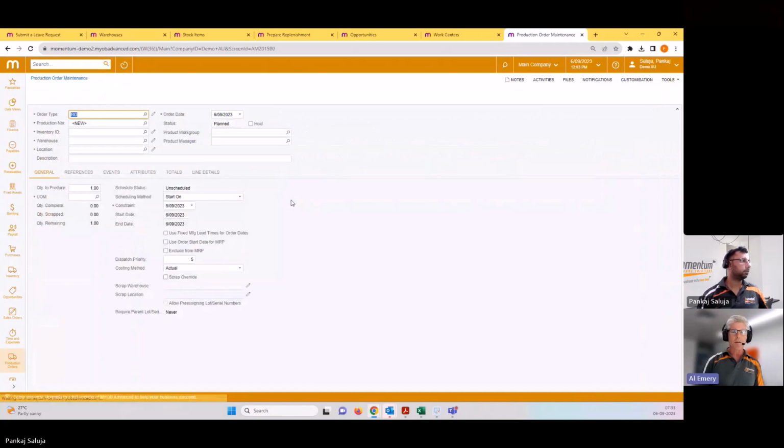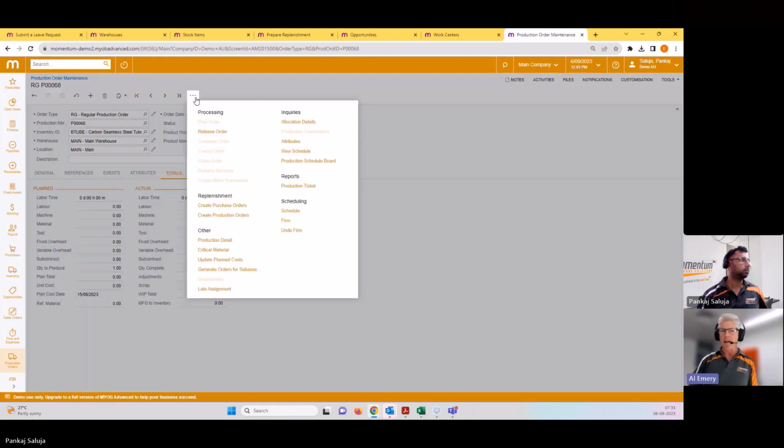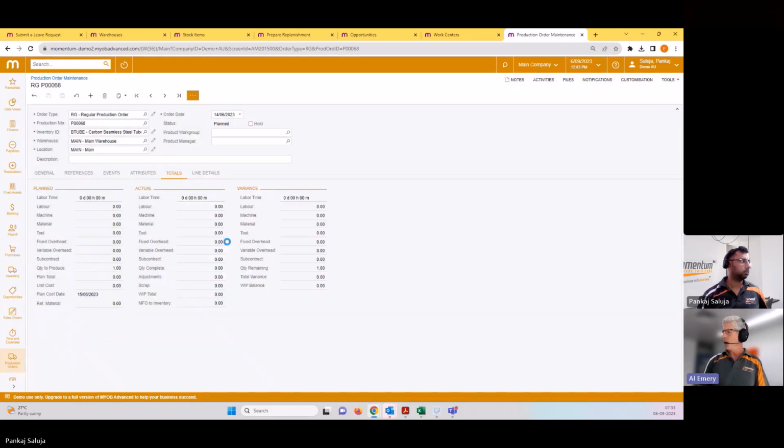and go to the totals. So the totals shows you a breakdown of each thing that you've made, each production, what the plan costs were, breaking down into labor, material, machine time, total cost, overheads, what the actuals were, and what the variance is. Very difficult to get that granular level of detail in EXO if you're doing manufacturing or fabrication type work. So we might just pause there.